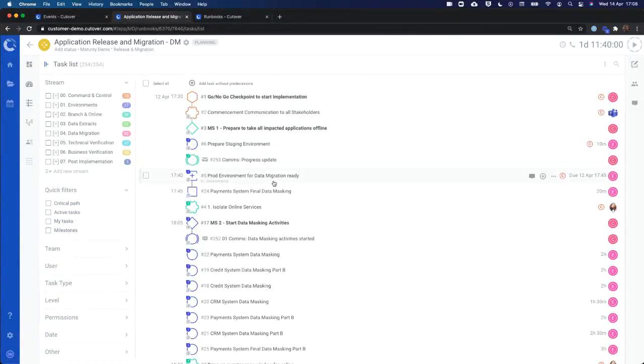What we also have is what we call a checklist task type. Rather than having a duration, you might want to put a due date as to when that task is due, a deadline. So it can take however long you want, but it needs to be completed by a certain date and time, and therefore you can add a deadline to that. Then we also have our communication task types. You'll probably notice a couple on my screen. These are the circle with the brackets, email and SMS, and we've also got another one which is a call task type.